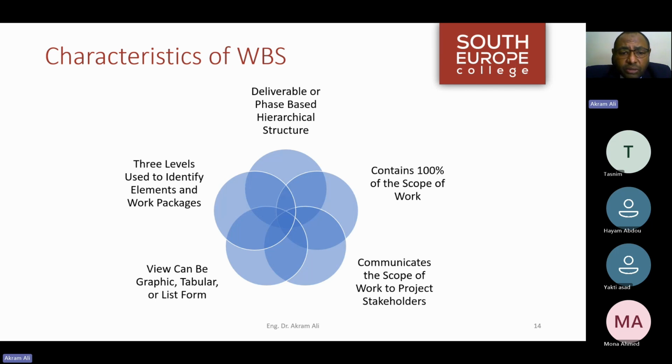So it's very important to understand that when I perform good work breakdown structure practices, I end up with a deliverable based milestones list. And this list can be used to build my contract, to indicate payment against milestones, which is very, very important, as well as